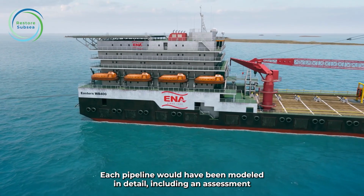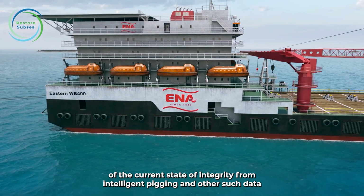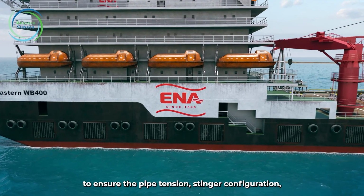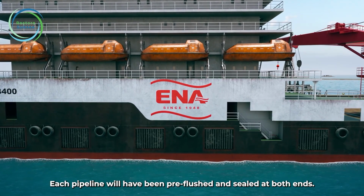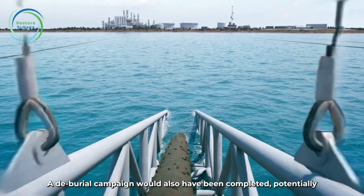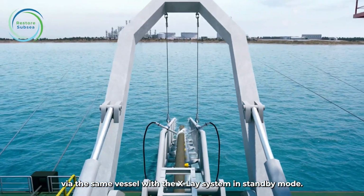Each pipeline would have been modelled in detail, including an assessment of the current state of integrity from intelligent pigging and other such data to ensure the pipe tension, stinger configuration and other parameters are optimal. Each pipeline will have been pre-flushed and sealed at both ends. A deburial campaign would also have been completed, potentially via the same vessel with the X-lay system in standby mode.